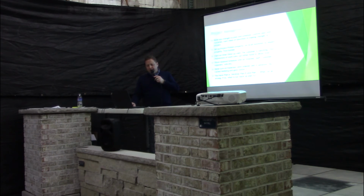And have a plan A and a plan B. So if this particular piece doesn't arrive when it's supposed to, which I'm thinking it's not, I got a plan. I'm going to go ahead and continue building this area. That's going to arrive at this date, and then we'll put it in. It'll create more work for us to do that, but I got a plan B to be able to keep things on schedule. So be really creative and have a plan B. Don't just run with your plan A, because when something happens, you're not going to be able to deal with it. Have a plan B in your back pocket.